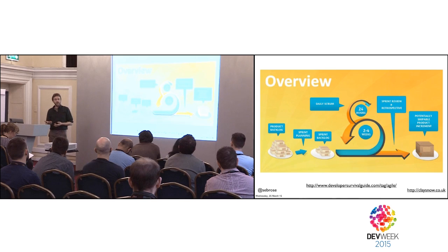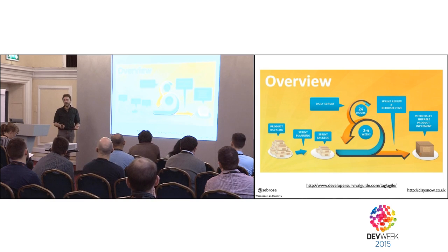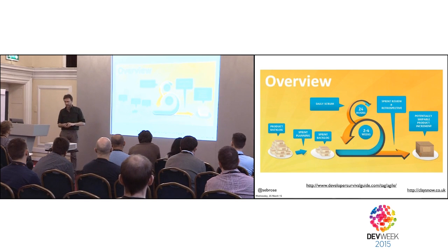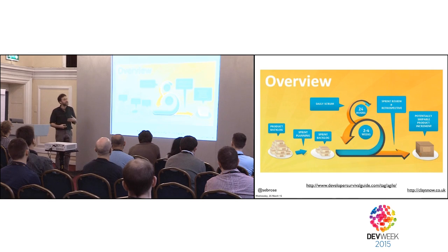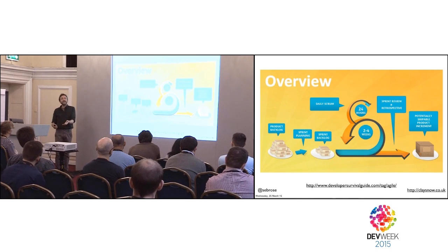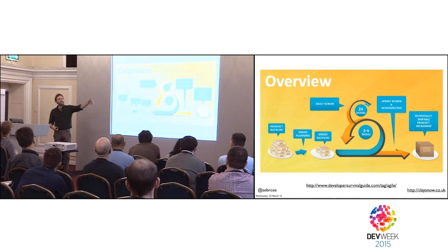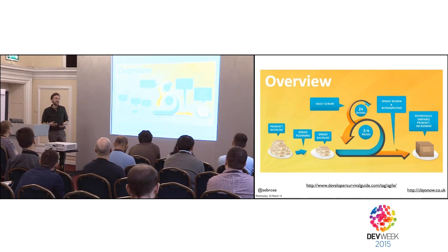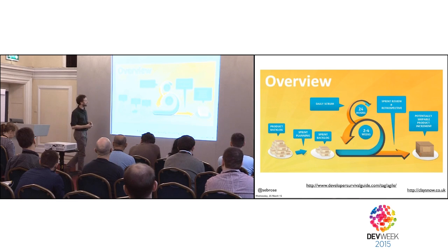And that certainly does work. There are other ways of implementing the Three Amigos meeting, and it's really very context dependent. So is your product owner or your customer proxy sitting in your office? Are they there all the time? Can you ask them questions all the time? Well, in which case, maybe you can have lots of really small Three Amigos meetings throughout every sprint, half an hour every day, every morning. And so you're capturing little bits of conversation. Is your product owner, you work in Bath and your product owner's in London, they come down once a fortnight. Well, then you do a half day of Three Amigos meetings. It's a similar thing as to the backlog grooming.